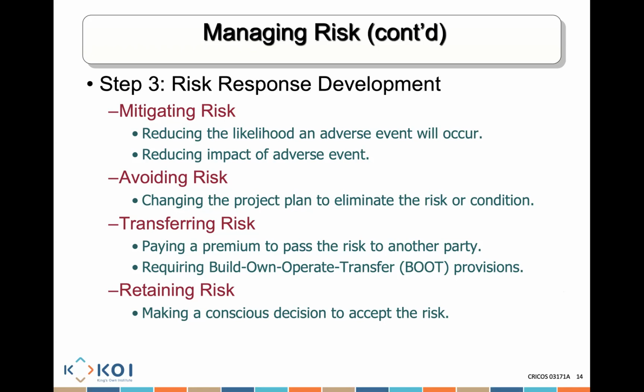Transferring the risk. What is transferring the risk? Transferring the risk is about paying a premium to pass the risk to another party, requiring build and operate transfer provisions.